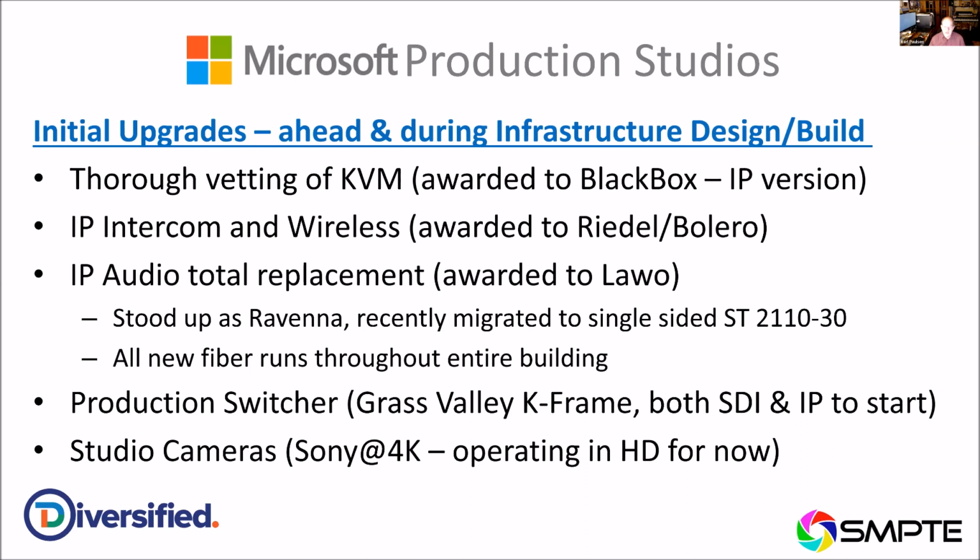Cameras aren't quite as complicated as production switches to put in, with the exception that cameras have a whole lot more things going into them, like tally, like intercom, like return feeds, like remote capabilities, all these other sorts of things. And of course, they bought 4K switchers and 4K cameras, but we elected very early on that we'll wire the infrastructure and prepare it bandwidth-wise and functionality-wise for UHD, but we're only going to operate in HD now. There are only so many things we can do, and this was integral to the planning process for this facility, was to be sure that we could get to the endpoints without having to rip everything out and start all over again.